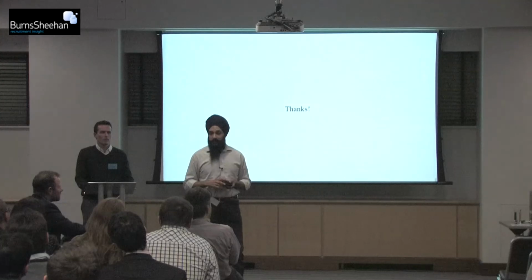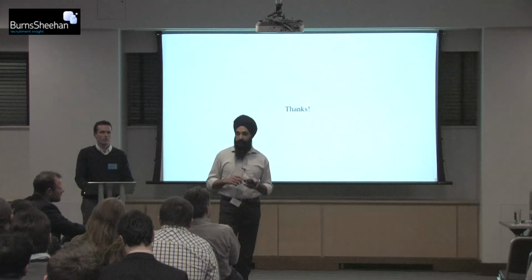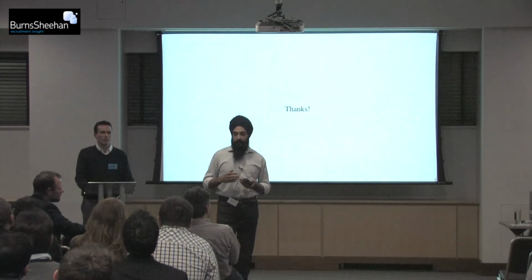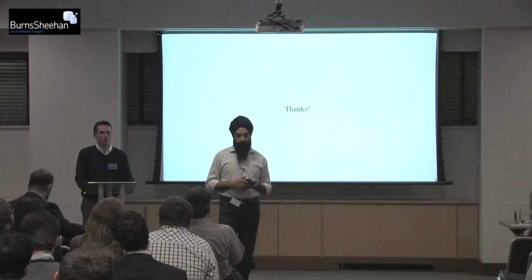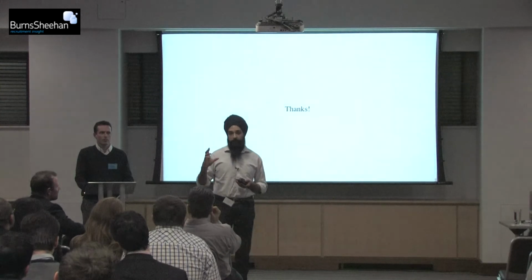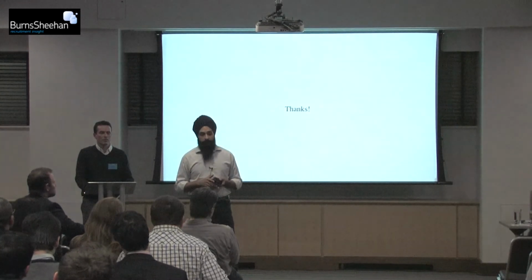The big danger now is that, as I mentioned earlier, every technology release at some point will fail. So part of the challenge when we're dealing with security and governance frameworks is to actually create a risk profile around the service. It's happened in some cases, it hasn't happened in others, in some cases it's in transition. For example, we have a personalization tool on the site. If the tool breaks, it's not going to break the entire website. It's a feature that would be nice to have if it's there, but if it breaks, fine. You can still carry on reading the content. It's not a biggie, effectively. So the risk profile on that particular product is slightly low.